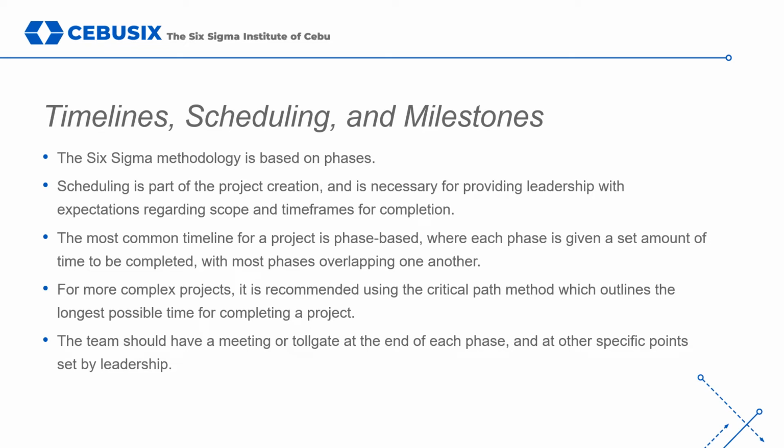Once a timeline is established, set up milestone meetings and dates to help keep the team on track and notify the sponsor or champion of the progress. In a DMAIC project, milestones are usually set at the end of each phase. However, teams can set custom milestones, and sponsors might require specific milestones if they are approving large resources or funding requests for a project. You can also set up milestones within a team environment to manage goals and tasks. These milestones can be kept within the team, though.